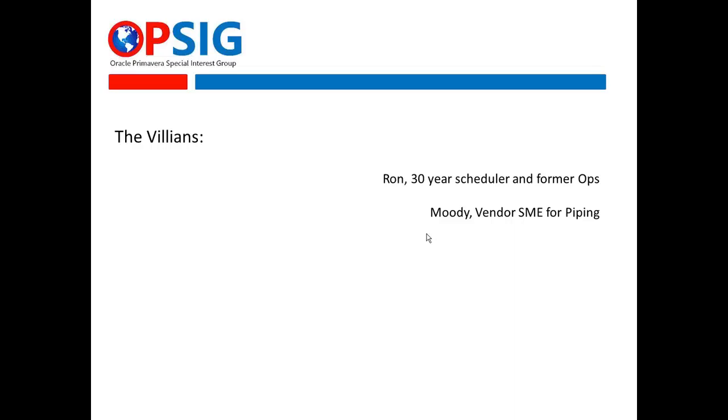I came to the 2 primary day shift, night shift guys who were going to be in the field running the work, and we targeted 72 hours. But as we refined the outage schedule and what had to happen, the reality was that they really had 6 days to get this work done, as long as they could manage that conflict between the neutral bus and the lead box and the 14-inch piping.